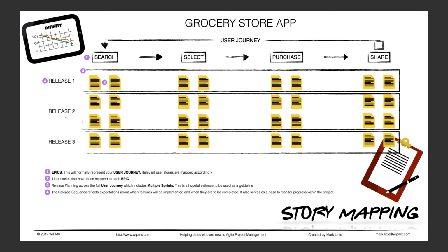in that particular sprint. And then depending on your iterations, if they're 2 weeks, this is a 6-week period. If you're doing 30 days, this represents a quarter. So think of this as forecasting in waterfall. If this represents a quarter, then you can see at the end of that quarter what you plan to release. So you're getting that vision. And this should be really beneficial, really helpful to let you know if you're staying on track or if you're starting to slip. And in fact, we cover that down here.